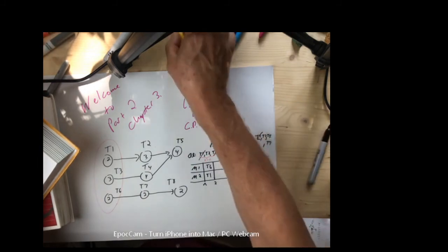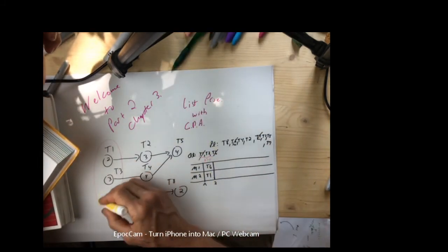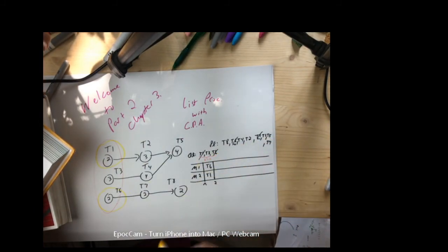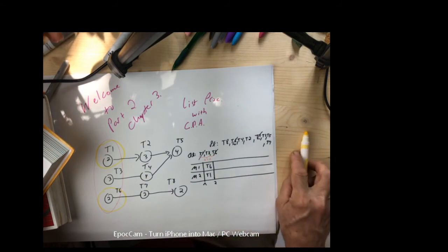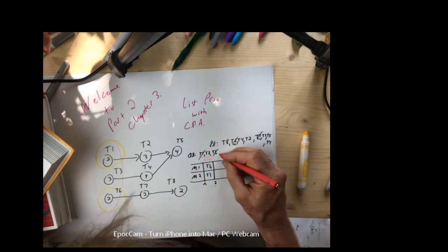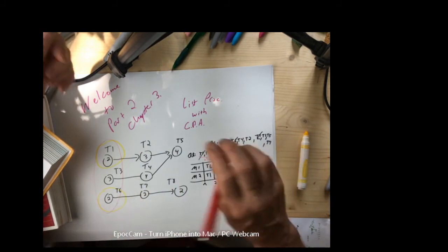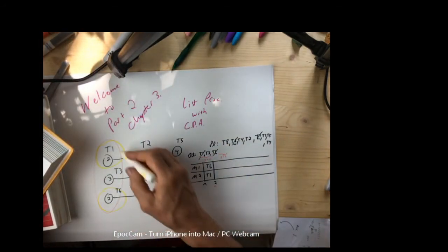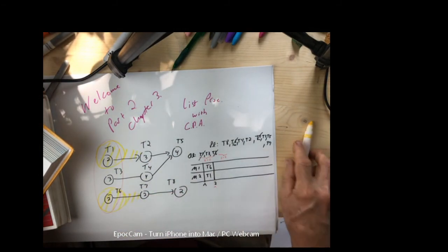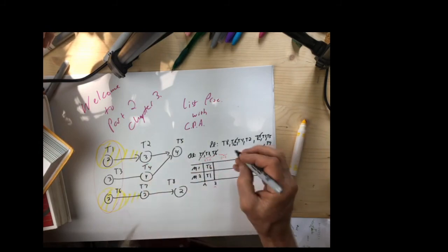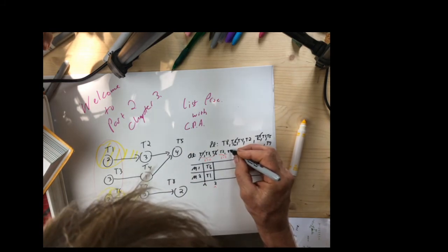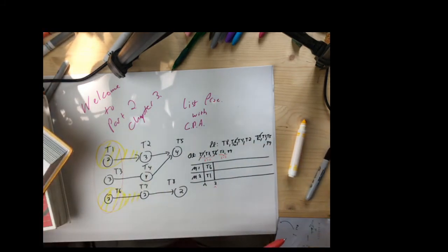And so, following what I did before, T6 and T1 are assigned, updated the priority list, updated the available list, put in my end times. Now I move my time marker forward. And so time is going to move to t equals 2. Now what happens at t equals 2? At t equals 2, both T1 and T6 end. Now when they end, that means T2 is available, and additionally T7 is available at time equals 2.